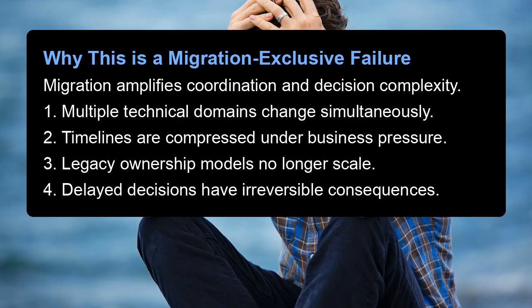Why is this a migration-exclusive failure? Migration amplifies coordination and decision complexity. 1. Multiple technical domains change simultaneously. 2. Timelines are compressed under business pressure. 3. Legacy ownership models no longer scale. 4. Delayed decisions have irreversible consequences.